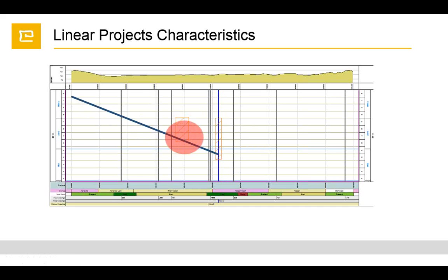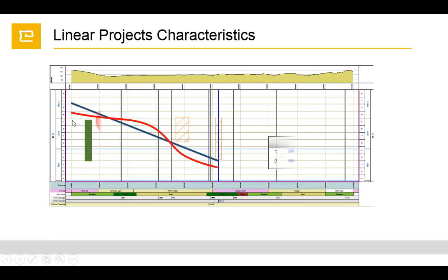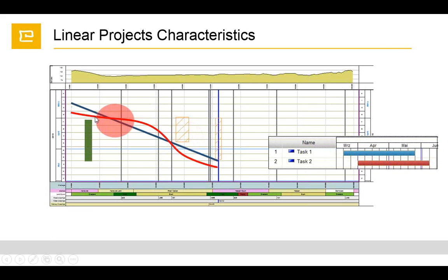Behind the system there is the scheduling, and when we reschedule the project we can keep the logics, and we will know exactly when we need to start the works. This is at the planning stage, of course, and we can get the productivity rates for different areas. As we see here, there are different productivity rates, so it affects the speed of the work, and it is giving us, for example, on a Gantt chart, how it is going to show.